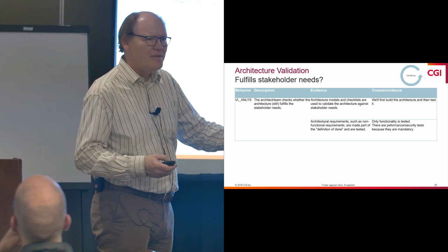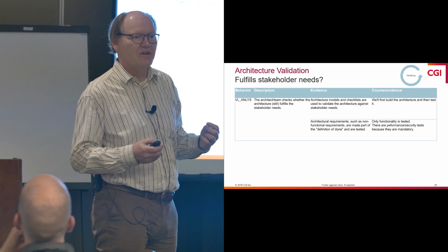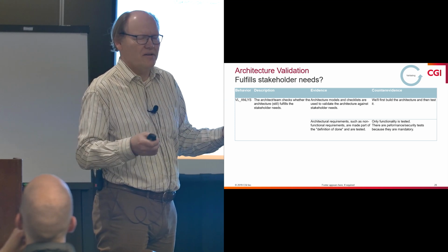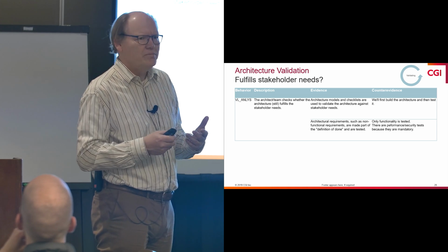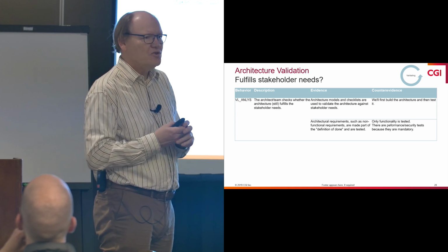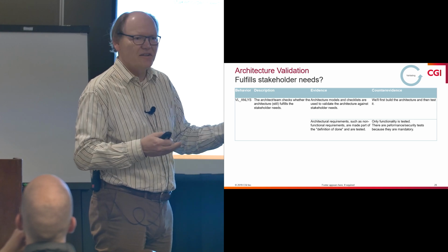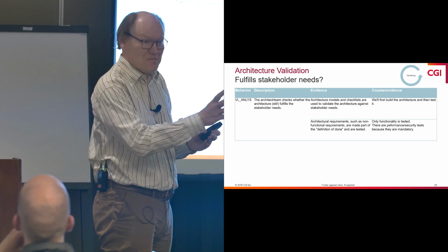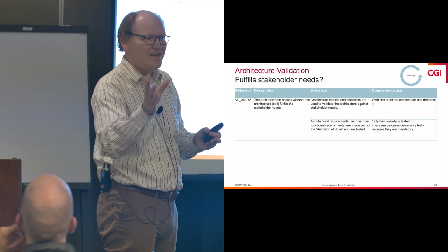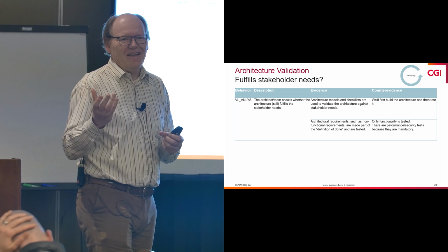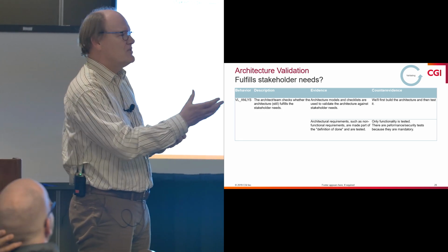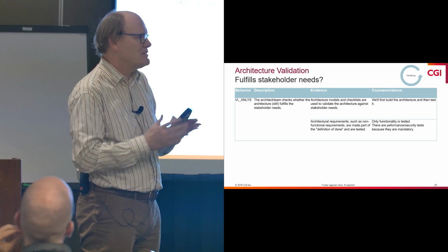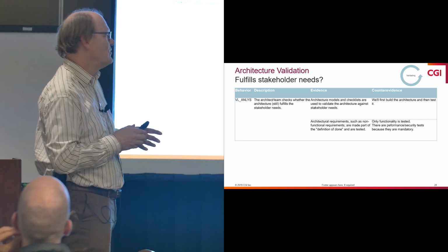But the project has gone wrong. I asked, didn't you make a prototype and validate the architecture? Oh yes, we made a prototype. It was in the project plan. I said, can I see the prototype report? We didn't make a report. Was the prototype successful? Did it prove that the architecture worked? No, there were problems with it. Okay, so did you stop the project and... No, there was no time to stop the project. We had a deadline, right? So if that's the way you deal with prototypes, why have a prototype phase at all? Just because it's in your project plan template, right? No, all of these things you have to think about consciously.